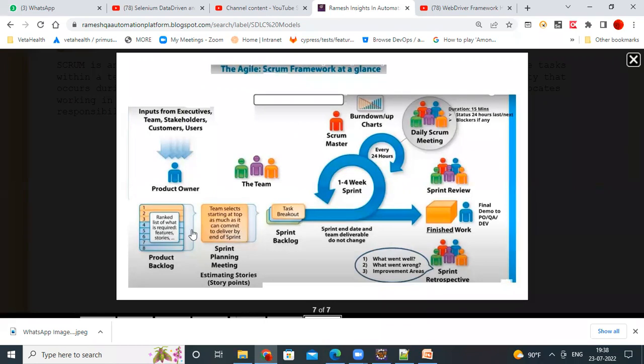Then they'll just give like perform the testing activities for this particular user story. So that all testing activities you will break down. Analysis, designing the test cases, preparing the test data, reviewing that. These are all subtasks you will create under that. That's a breakdown of your tasks. Then that's a Scrum team will perform the tasks that are assigned to them. That's a Scrum team responsibility.